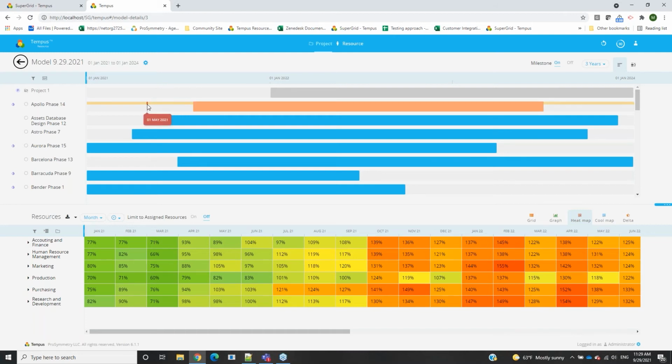But when you do hover over this bar, if you hover over the top in this yellow bar above, you will see this kind of red down option showing you a date. And all that will do is show you a constraint of a given project. So you can go ahead, you can click on it again to move it left or right and say, okay, well, I know this project must start at least on the 1st of April. We can go ahead and add that.